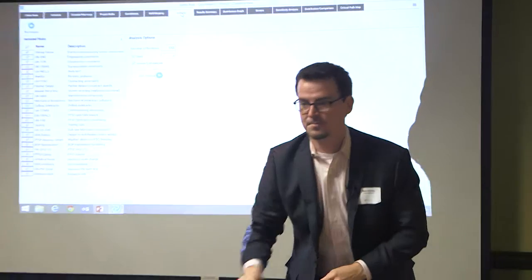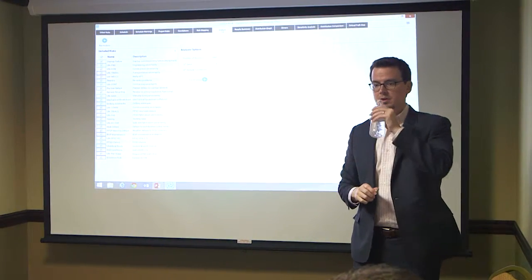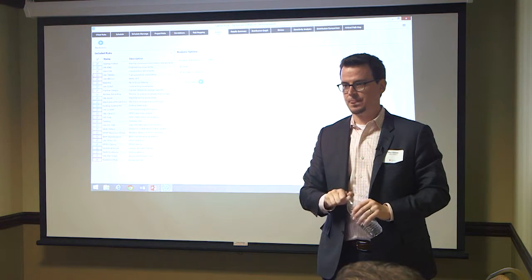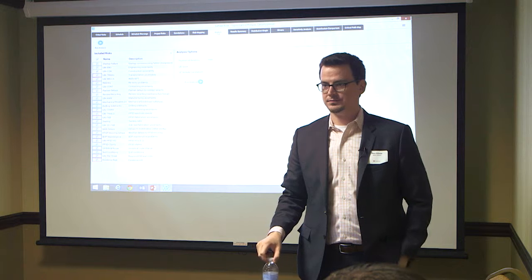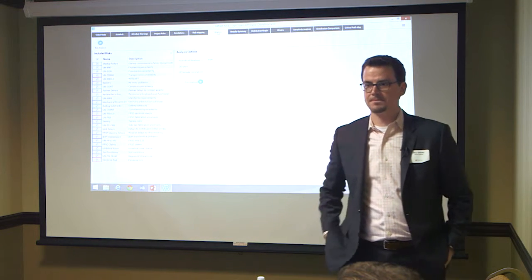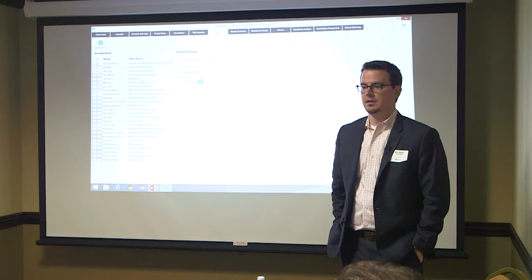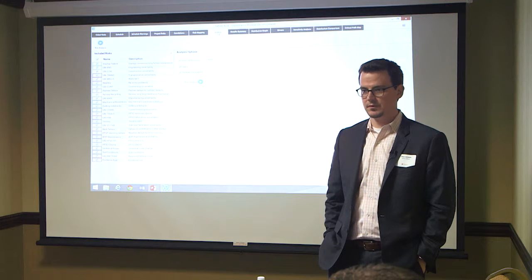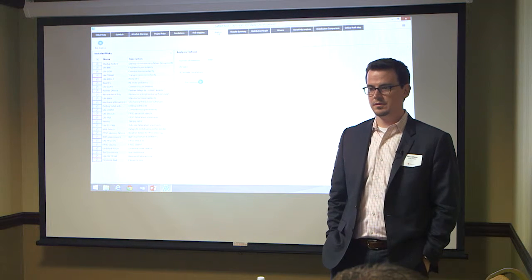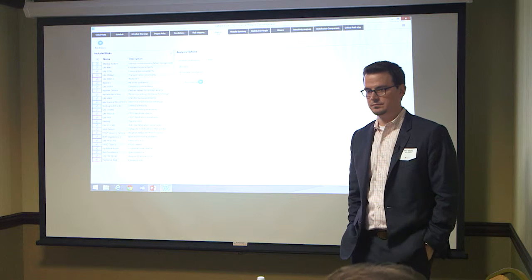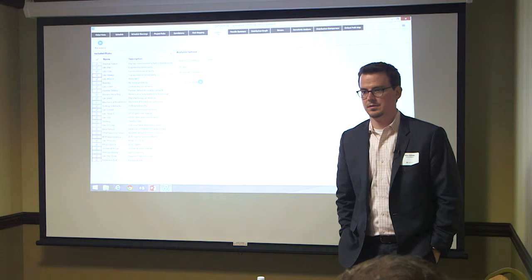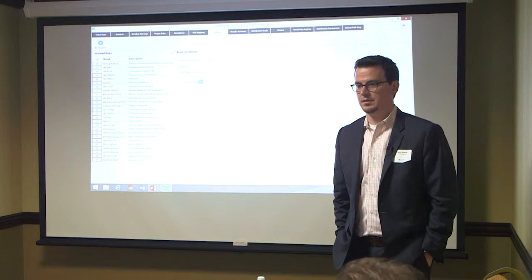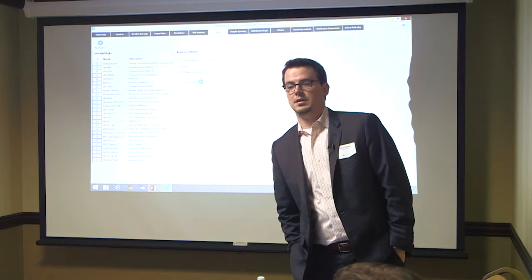You're applying risks as a percentage of the original configuration. In PertMaster, if you try and do that to short duration tasks, say a 2-day task embedded in a series of longer tasks, plus or minus 20% applied to 2 days has no impact. Whereas the task right before it is a 20-day task, and plus or minus 20% is measurable and predictable. Is your underlying schedule in hours or days, or how do you handle percentages applied to a short duration?